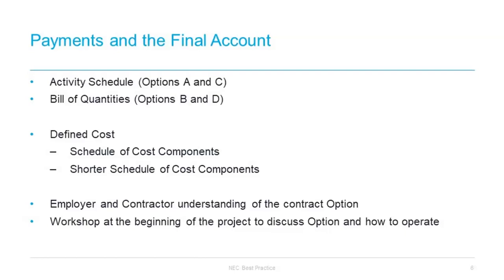This means that the contractor does not benefit or lose out on a good or bad rate in their contract as a result of a compensation event, but that they must have accurate contract Part 2 data, otherwise bill of quantity or other industry rates might be used to assess the compensation event.